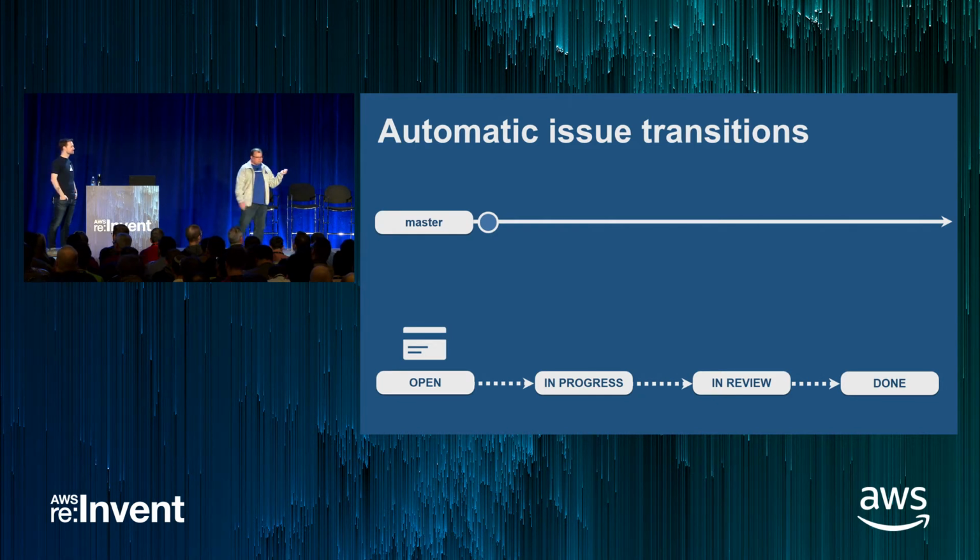As we saw earlier, we've added features to Jira to help practitioners, like developers, even designers, broadcast signals about their work. To tie together the systems they're using today and Jira, we take advantage of a Jira feature called Advanced Workflow Triggers. That starts with your Jira admin introducing, for example, your source code control tool to Jira. Once that happens, Jira sets up scheduled synchronizers or webhook synchronizers to watch the work that's going on in that other tool and derive status from it.